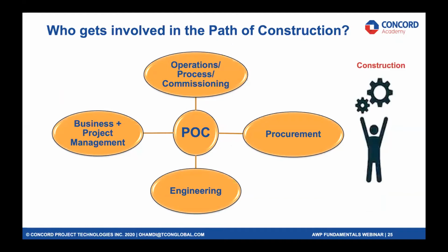In building your path of construction, sometimes you may have a very good idea that would save time, but it costs more. If the project is limited to a certain budget and is cost driven rather than schedule driven, that discussion and alignment has to happen. Should we go for it or not?